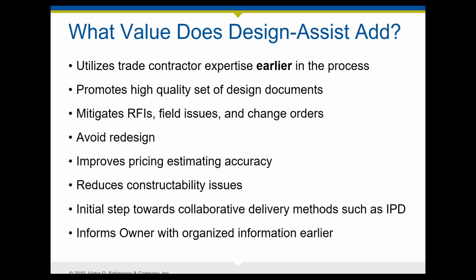Courts will often say, if you were involved in the design of this, if you contributed to the decision-making process, you are taking on design liability. And that's why we'll talk about what insurance is available to subcontractors as well as contractors on design liability.